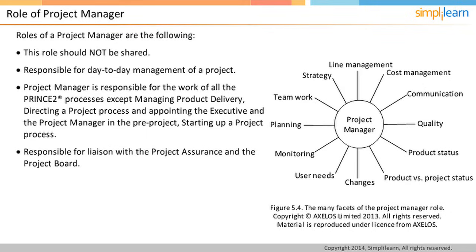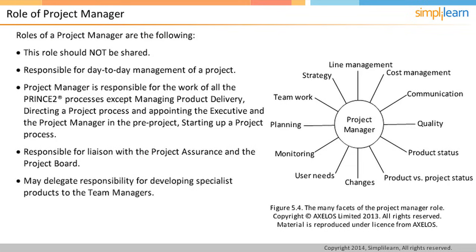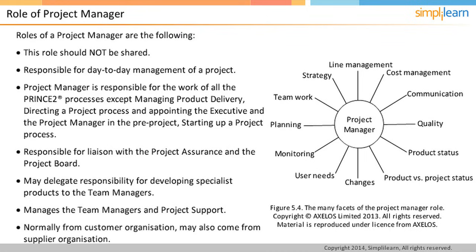A project manager will need to send the highlight report, which reports the progress of the stage, to the project board. The project manager will interact with project assurance and will seek their active involvement in developing the business case and benefits review plan. If there is a team manager present in the project environment, the project manager may delegate responsibility for developing specialist products. The project manager will be responsible for day-to-day management of the team managers and project support team members. Usually, the project manager comes from the customer corporate organization. However, there may be projects where the project manager also comes from the supplier organization. In the next screen, we will look at the senior user role.